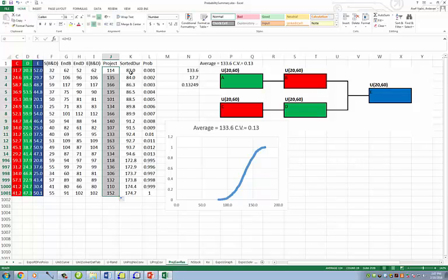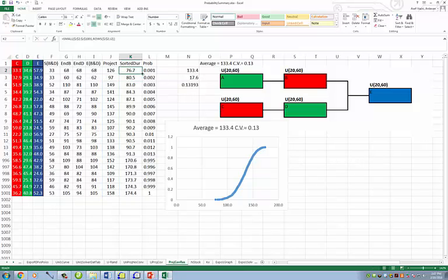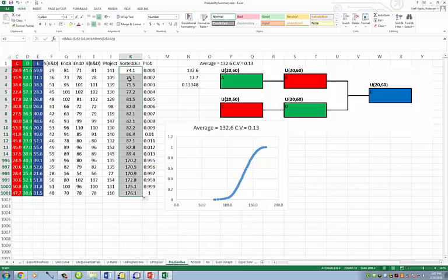Then I go here, and as before, I will type small. I mark the matrix of the project. The first row is 1, and then it will become 2, 3, 4. Copy it down. Now I have all the durations sorted. This project may take as little as 74 days, or it may be as long as 176 days. So I have here average, standard deviation, coefficient of variation.